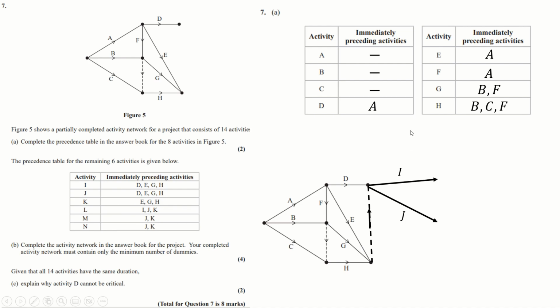But if you start I and J from there and have the dummy variable activity going this way, then you can get K going from here, and you can say it just requires E, G, and H. Now I've joined K and J up because I can see that some more activities require both of those. So let's join those up and say, okay, L requires all 3.